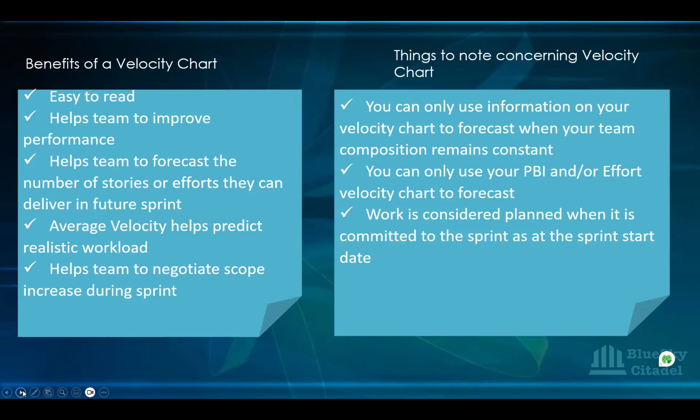And that is what you're telling the PO. The PO is coming, and the PO noticed that the last sprint they did 80 story points, so they want to take 80 story points into the sprint for them to work on. And then you, as a Scrum Master, are negotiating that with the product owner, saying half of the team members are not available, so there's no way we can do 80 story points. We'll be able to do 40, 45. You can give a buffer of maybe 40, 45, and that is what you commit to in order to be able to achieve. Because if you take that 80 in, realistically you won't be able to complete it.